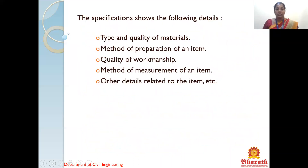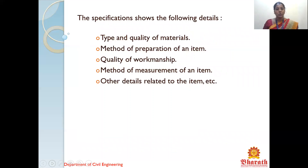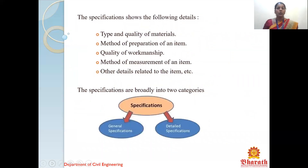These are the specification details followed in the specification process: the type and quality of material will be shown, the method of preparation of an item, BOQs — that is Bill of Quantities — will be followed, quality of workmanship, methods of measurement of an item, and other details related to the item. The specifications are generally classified into two types: general specification and detailed specification.